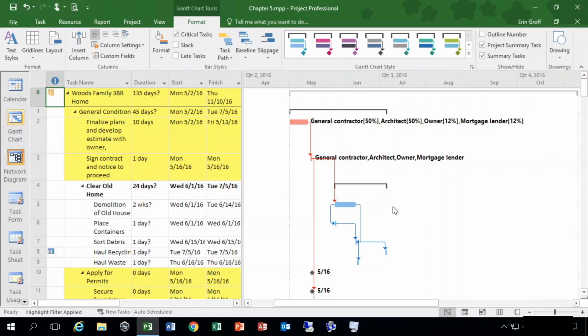If you have resources that are dedicated to your project, you may wish to review their assignments to see if there are times when they are not working on a task and can be assigned to help on a task on the critical path. You may also want to review those resources which are scarce or expensive to optimize their usage. Finally, you may decide to reduce the scope of the project and remove or shorten some tasks as a result.